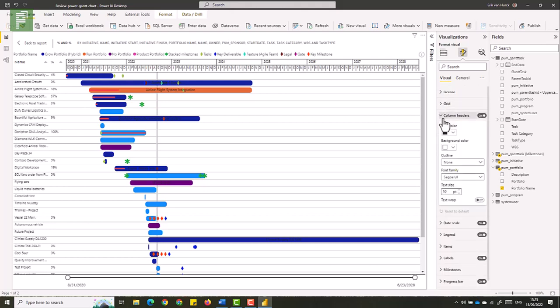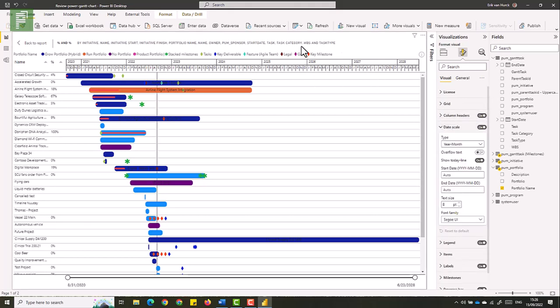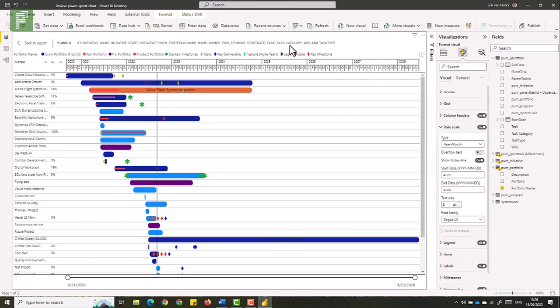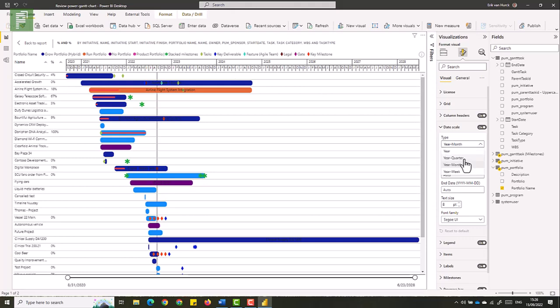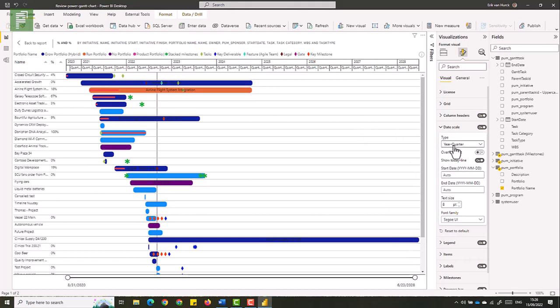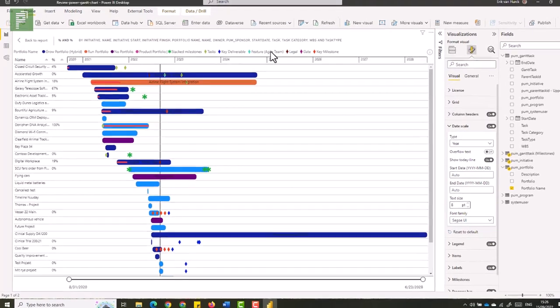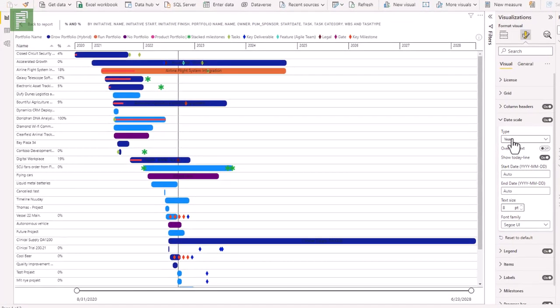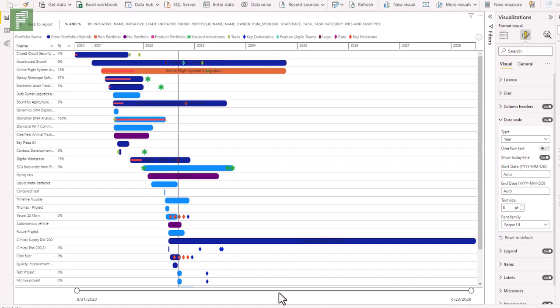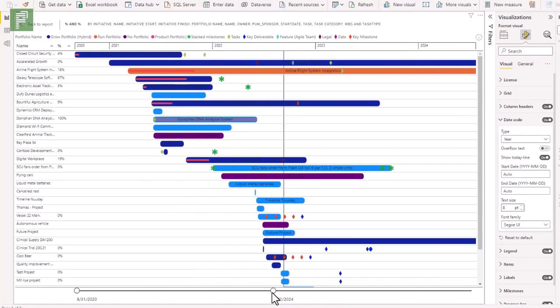Column headers, normal situation here. Date scale is something that you can change the top bar where it currently says years and months. But we can change this to years and quarters. And the larger your time scale is, the larger you want to have your date scale, obviously. Now, because this is spanning multiple years, you might want to only look at year values. You might also want to look at quarter values.